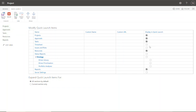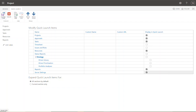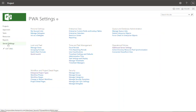These are the defaults. You can add the Timesheet once we've configured that. We'll add Issues and Risks once those are configured. Status Reports are not exactly what you think — they allow a project manager to request an update and have a team member provide a narrative response. For Strategy and Portfolio Analysis we'll come back to that. I want Reports and Server Settings — check that, save and close. Now on the left-hand side I see Server Settings.